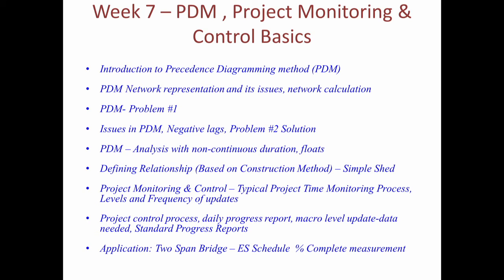In the same week, we also started the concept of project monitoring, which is very important. We reviewed the BIS standard and the processes it had for project monitoring. We then went to the micro level and, using examples, showed how percentage complete is what is basically required to do effective project monitoring — how we calculate percentage complete with different methods and how each method can actually give various answers. This is certainly a practical issue, because if the planning team or execution team does not use the appropriate method, you will not be able to get a proper reflection of the progress happening on the field.